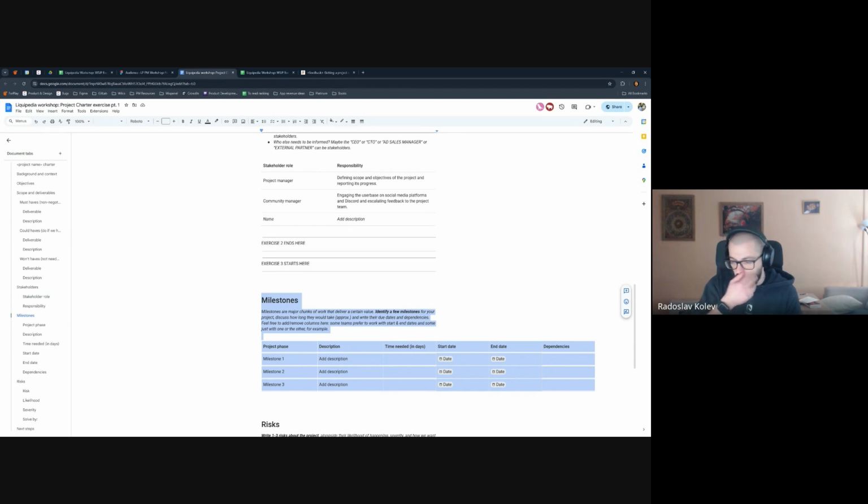Again, it's up to you to decide how you want to phrase those milestones. Usually I find it a good practice to not make them too granular or too vague. So for example, if you need design, you can just say, hey, design work, and this is the milestone. You don't go like design this screen and that screen and the third and the fifth screen. Same for, hey, let's implement the designs. You don't implement each screen individually, right? If you want to do a social media campaign, you just say social media campaign and not Twitter post, Facebook post, whatever.